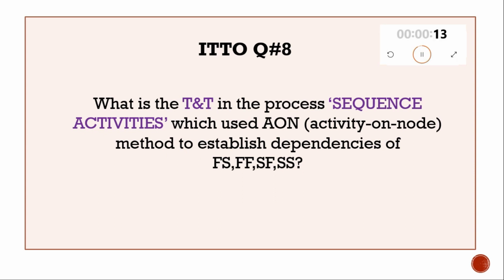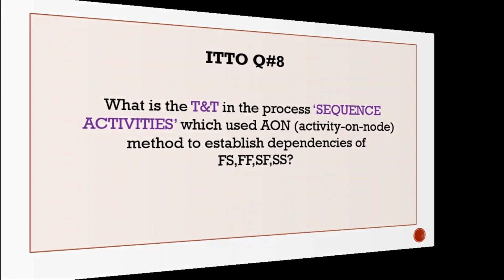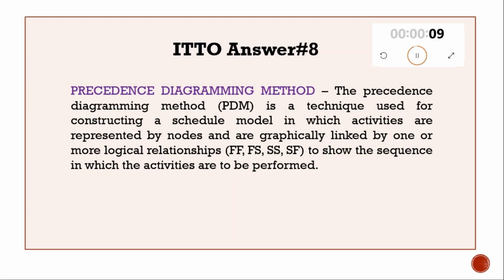ITTO question number 8. What is the tools and technique in the process sequence activities which uses activity on node method to establish dependencies such as finish to start, finish to finish, start to finish, etc.? Answer 8. Precedence diagramming method, or shortly PDM.